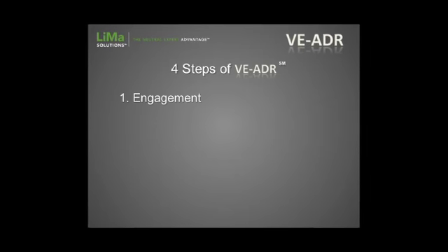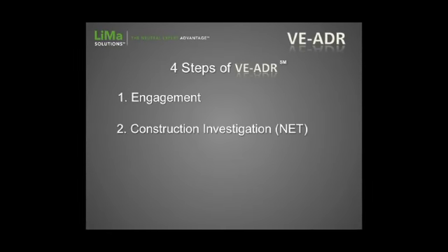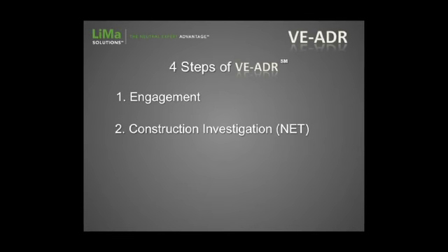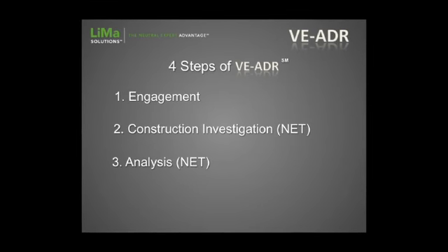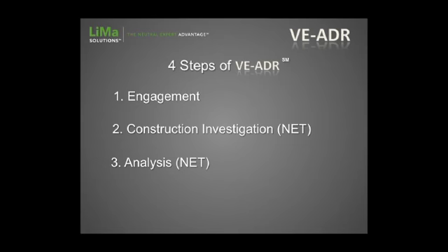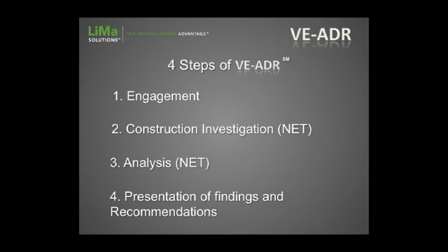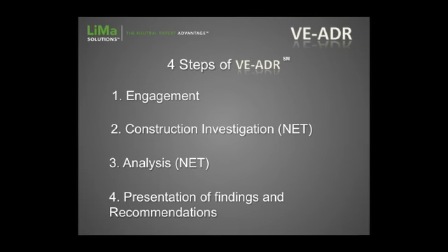So the 4 basic steps of VEADR, as I call it, are: the engagement, which Bob Friedman and I talked about the other day; the construction investigation by the neutral expert team, that's what NET is; and the analysis by the neutral expert team. And then, if we're working with others, we would hand it off to the mediator.